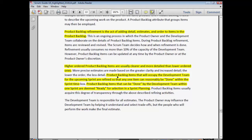Product backlog items that will occupy the development team for the upcoming sprint are refined so that any one item can reasonably be done within the sprint time. Items that can be done within one sprint are deemed ready for selection in sprint planning. 'Done' and 'ready' are key terms in the Scrum Guide. Items — product backlog items, also referred to as stories or features — are said to be 'ready' when they're clear enough to be done in a sprint, and 'done' when the team has built and delivered those items to a satisfactory condition that meets their definition of done.